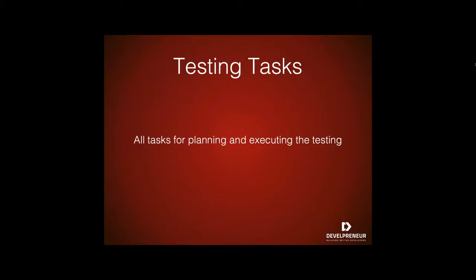These tasks should also have corresponding tasks and milestones in the overall project tracking tool, be it Jira, Bug Tracker, whatever. If this is a multi-phase process, or if the application is to be released in increments, there may be parts of the application that this plan does not address. These areas need to be identified to avoid any confusion should defects be reported back to those future functions. This will also allow the user and testers to avoid incomplete functions and prevent waste of resources chasing non-defects.